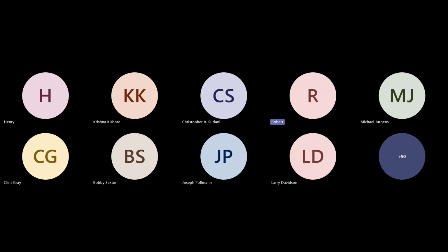So one thing we did, it only works in some areas. We have a lot of big build assemblies for massive compressors, and we build them on projects. When we have certain long lead items that are a continual constraint, what we've done is remove them from the job or zero them out on the job BOMs and put them as a project resource, which then doesn't constrain the other parts on the job.